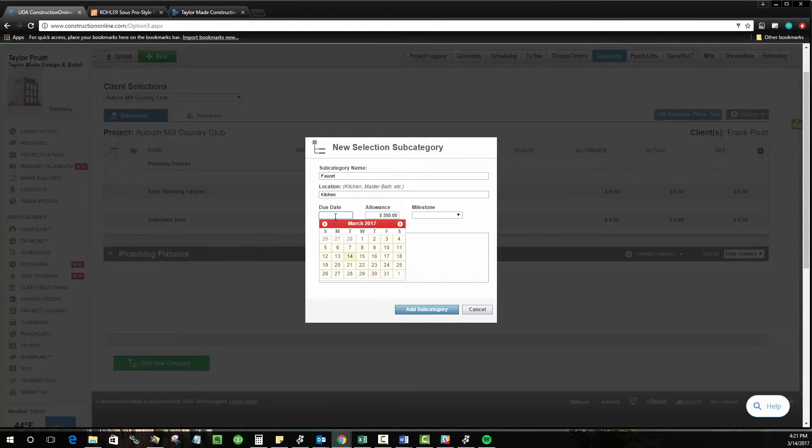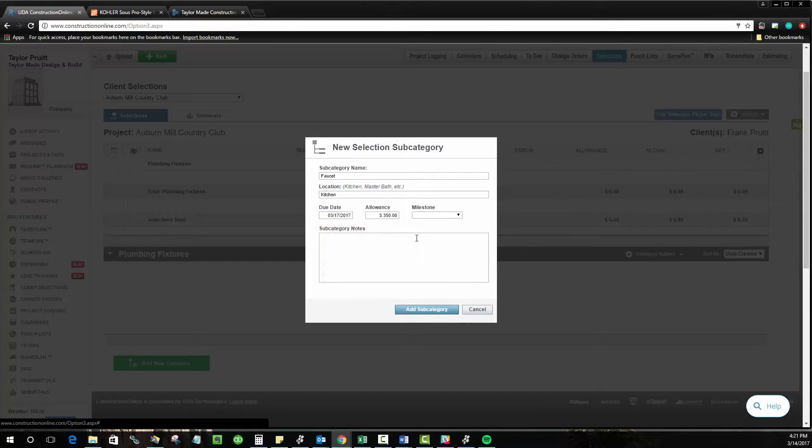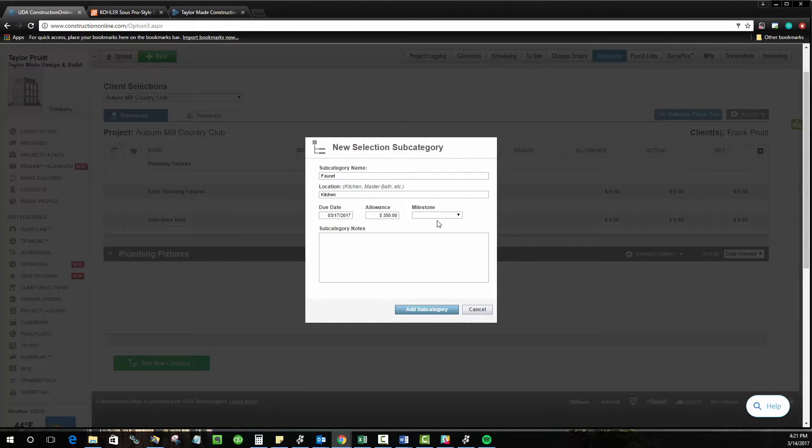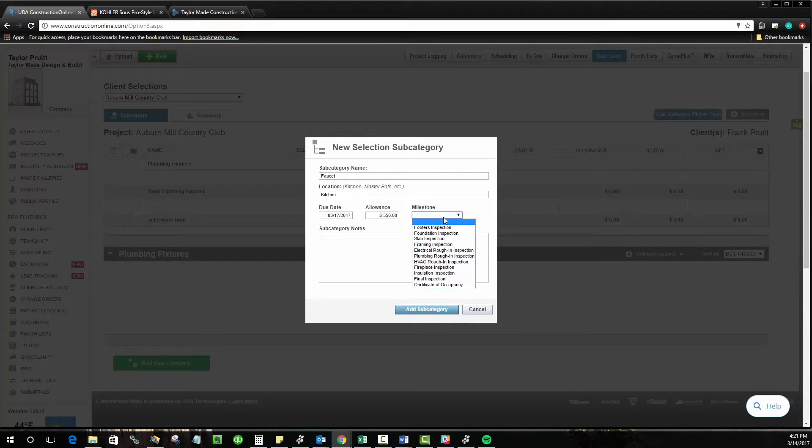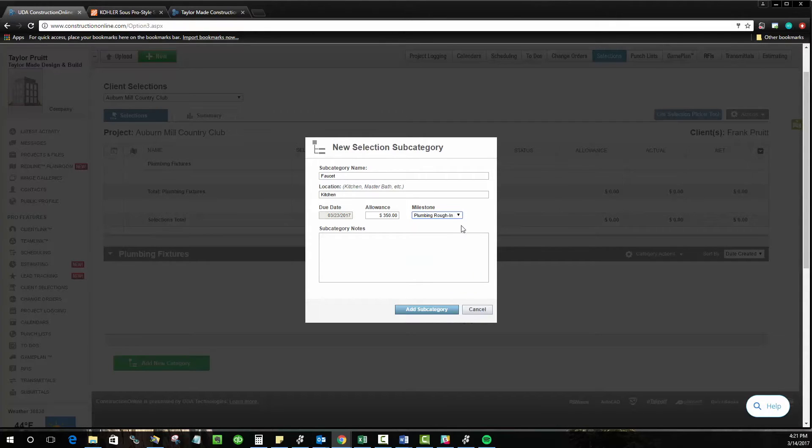You can manually assign a due date just by clicking the field and choosing from the drop-down calendar, or if you've already created a schedule for the job, you can create schedule milestones, which many of our clients will do, and actually tie the selection due date to those milestones. In this case, let's say that once our plumbing rough-in inspection is done, then that's when our selection is going to be due.